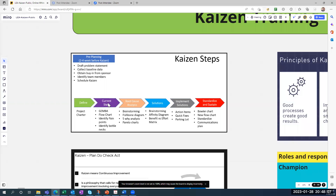Once you're into the Kaizen event, you have the team, you do a Gemba, you make a flowchart, identify pain points and bottlenecks, then do root cause analysis — brainstorming, fishbone, 5Y, and Pareto. Then you go to solutions: brainstorming, affinity diagram, and benefit versus effort matrix. Once you know which solutions you're doing, you implement them into an action item log. There's also a section for quick fixes and a parking lot for things scheduled for a future Kaizen.